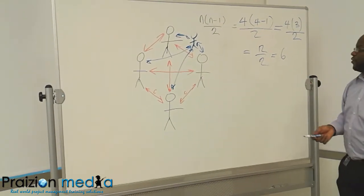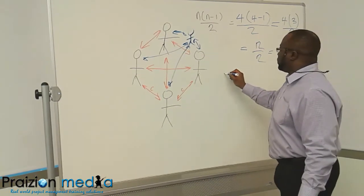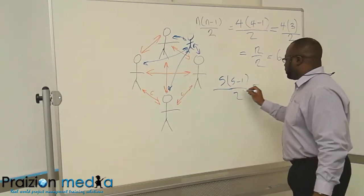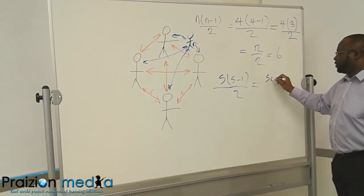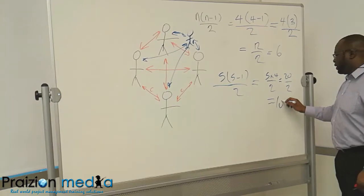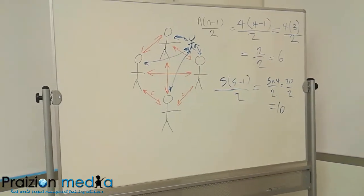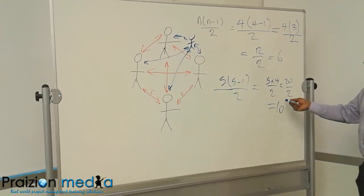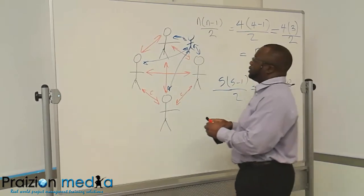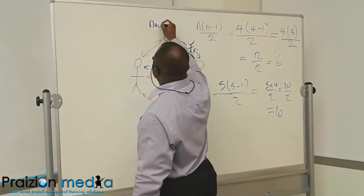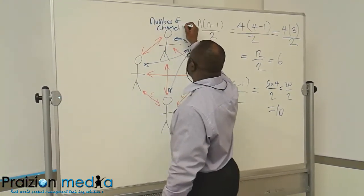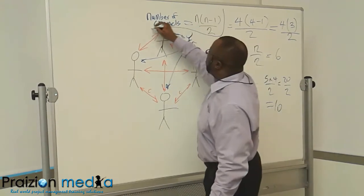So if you've got 5 people, you've got 5 times 5 minus 1 divided by 2, and that's going to be 5 times 4 divided by 2, which is 20 divided by 2, which is 10. 10 channels of communication. So this is the number of channels and the N is the number of people. So the formula could actually say number of channels is equal to this.